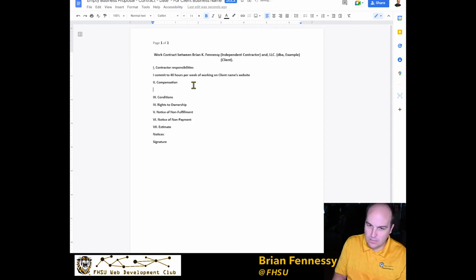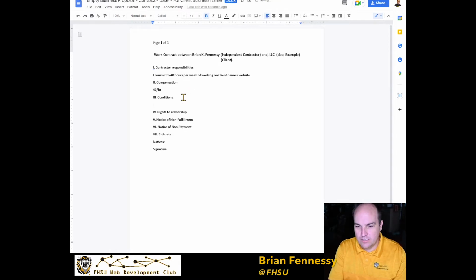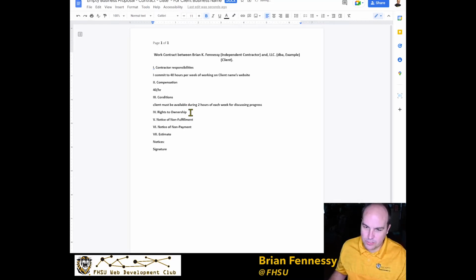Compensation, maybe it's $30 or $40 per hour. Conditions, and this would put any conditions. Client must be available during 2 hours of each week for discussing progress.